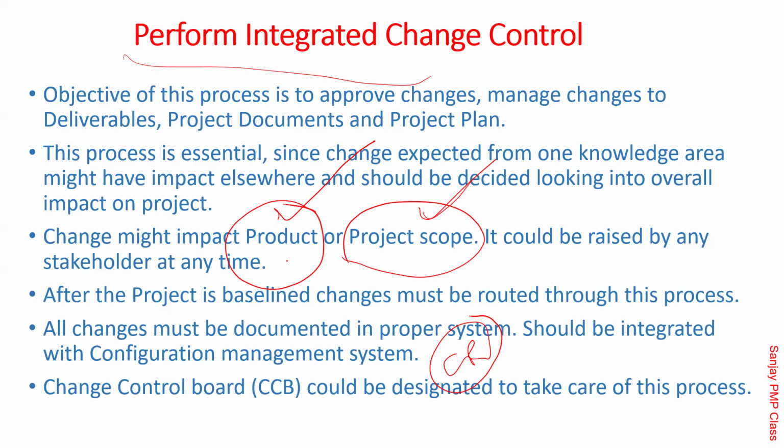That's the requirement. The auditor came and said these people look a little weak about it. They will all have to be given AI training. Now, it looks like a great idea, but Swati, it will need time. It might need money as well. Correct? Yes. Now, this is called project scope. It is not product scope.